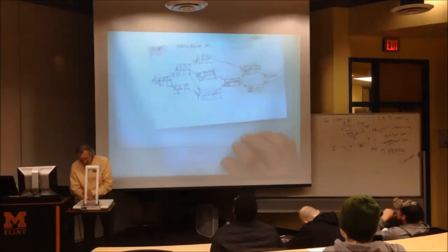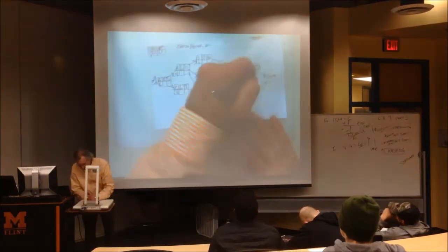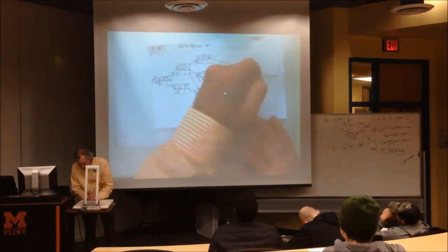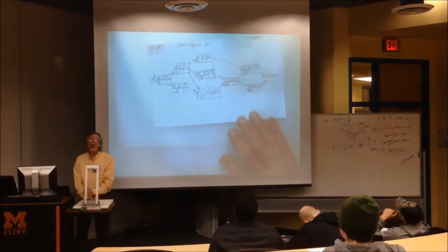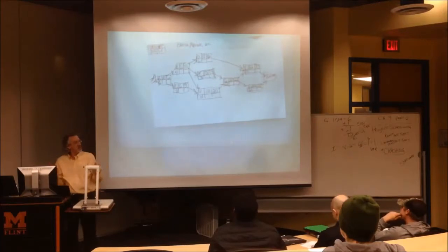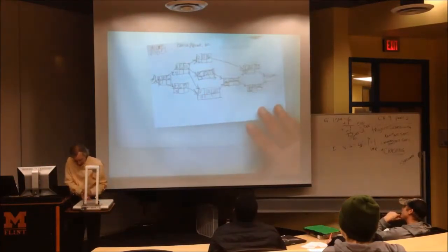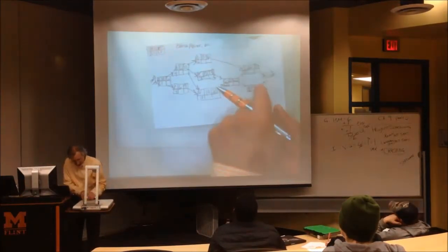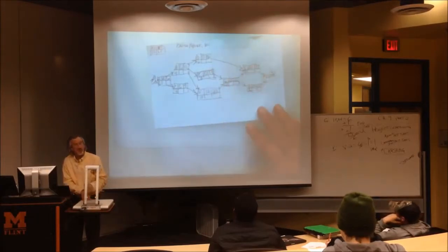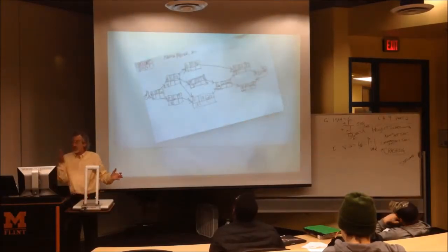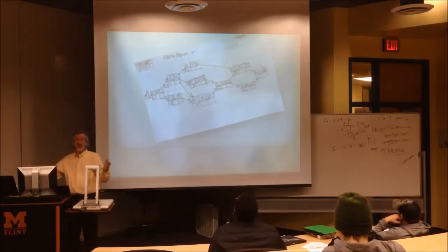Let's go with H. Start as early as 22. Add 6. 28. This project completion time, expected completion time, is how many units of time? 30. There's 28 going to the finish and 30 going to the finish. They all have to be finished, so we've got to go with 30. That's the earliest this project could be finished, if everything goes on time and goes through.